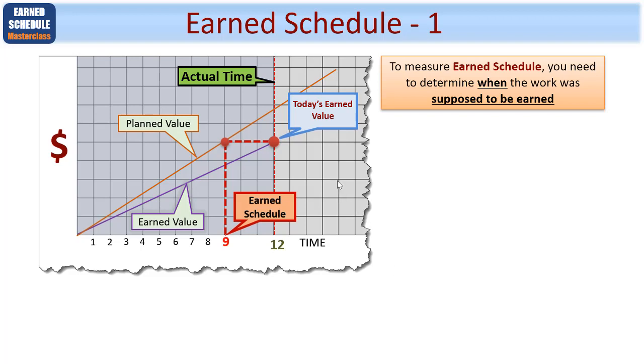Let's go back to our diagram we've already used. In this case, showing a time frame, let's imagine in weeks, where today's time is at the end of week 12. Up to this point, you've been plotting your regular earned value amounts, let's imagine at the end of each week, and here is your current value of earned value. Here's the planned value graph showing you up to the end of your project. And what you'd want to do is to throw your earned value amount back to the point where it hits the planned value curve and drop it down.